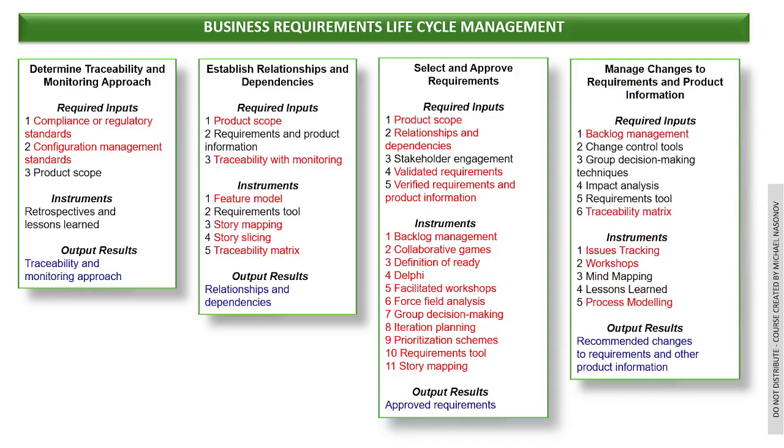And finally, like I told you, it is absolutely normal and pretty common that during project execution, constant change requests are coming. However, as a business analyst, it's your job to communicate these change requests, get them verified and approved before going into action. Manage changes to requirements and product information. Inputs, backlog management, change control tools, group decision-making techniques, impact analysis, requirements tool, and traceability matrix instruments.